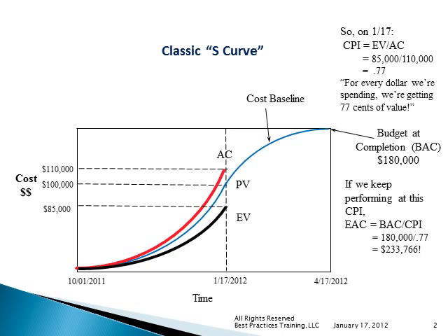If we divide that by our cost performance index to date, whoops, we get a new EAC, an estimate at completion, of $233,766. This is saying that if we stay at this current CPI, if we don't take some corrective actions and make some changes, we're going to end up spending $233,000 plus for this project at the end. Not good.